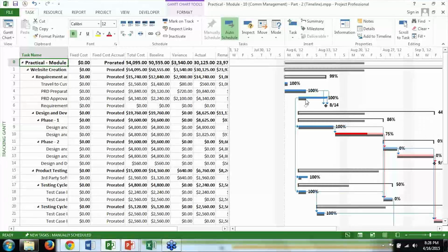So the planned date was to be completed here. This is the initial baseline, the baseline that I had first. Then it got changed, so it got finished later. Similarly, you can create 11 baselines together in Microsoft Project.